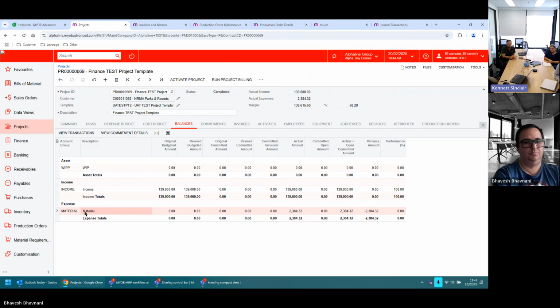See, the difficulty I've got with this, and this is what we went over with Justine, is that at the moment, we recognise income in relation to the costs over the budgeted cost. Doing it this way means that you don't take any profit into account until the job's completed. Is that correct? Yes, it'll show up in your balance sheet until then. You're correct. So over months with a WIP account, you could go months making losses, and all of a sudden you make a big profit.